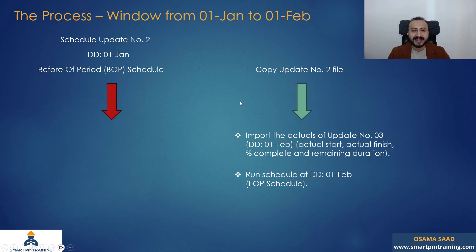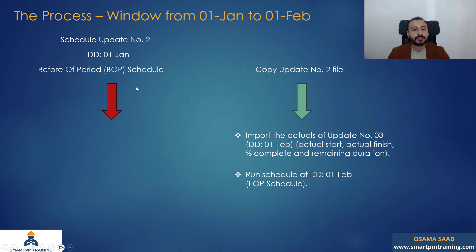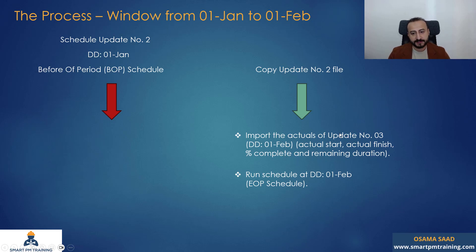Why did I do that? Because I wanted to split the actual progress from the logic. When I do that, I am ignoring any changes to the schedule that took place during that window, because when you prepared update number three, maybe you made some changes. And I want to evaluate the delays before any changes — that's the purpose.